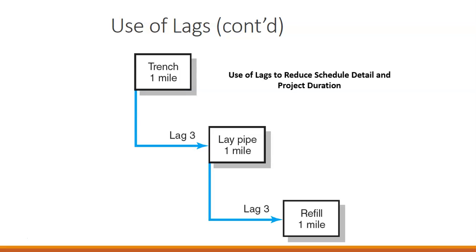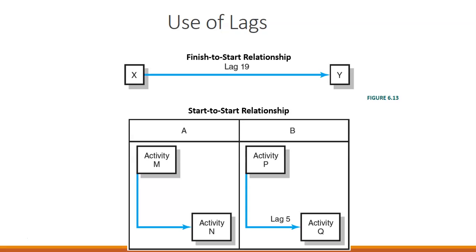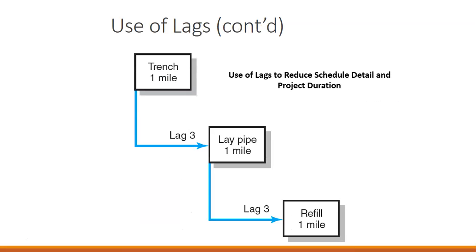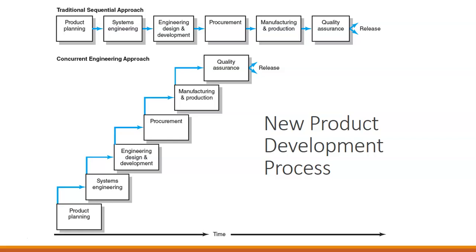So this is a use of lag. We have a lag of 3, so we have 1/3, 1/3, and 1/3 in our product, where over here with a lag of 5, we would have 1/5, 1/5, 1/5 when we're creating laddering.